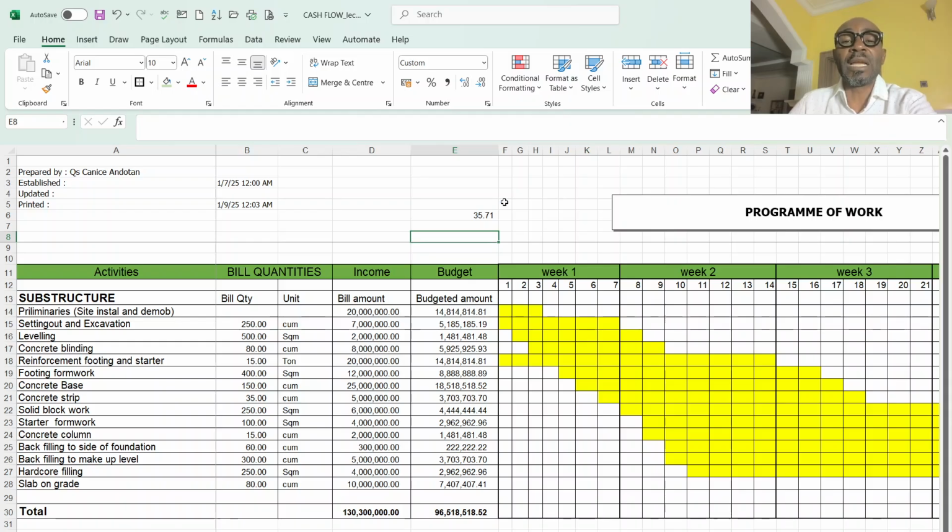So that on the days I have obstruction, maybe as a result of unfavorable weather, or maybe workers are on rest, those days that I have worked beyond the normal cubic meters I needed to achieve can cover up for those lost days. So I shouldn't dig less than this, but I can go more.